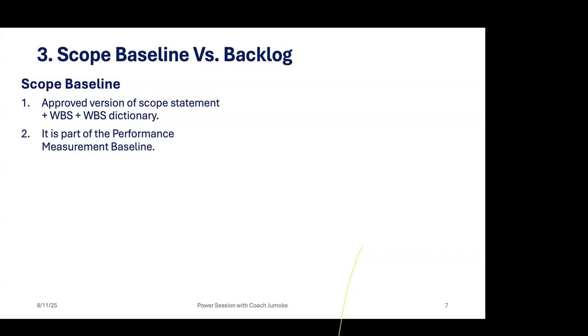And that is where EVM is very important, where you use the cost variance, CV, the schedule variance, SV, the SPI, schedule performance index, the CPI, cost performance index, EAC, estimate at completion, BAC, budget at completion. Then you have estimate to complete, ETC. All these are to help you determine where you are now in terms of cost and time, and to also be able to forecast that if we continue this way, this is where we would be.